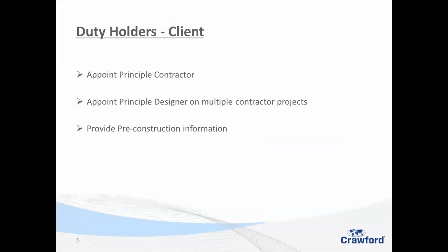Duty holders, well, we've got good old clients. He has to appoint in writing the principal contractor, and as I said, if there is multiple contractors used, then you must appoint a principal designer. Also, the client must provide pre-construction information. If they've got anything then they need to tell the principal designer or the principal contractor, they must do so.